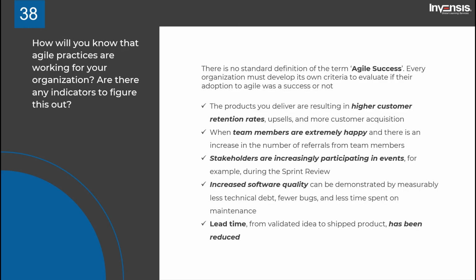Moving on, according to you, what justifies canceling a sprint? This is a very general question for which you need to answer very carefully. The right answer would be that a cancellation only occurs when there's a drastic change in priorities. For example, if some critical requirements with high priority are suddenly marked as a low priority, there would be no point in continuing further. Most importantly, the product owner can only make a call to cancel the sprint. Though, they do not have absolute power to go ahead and cancel.